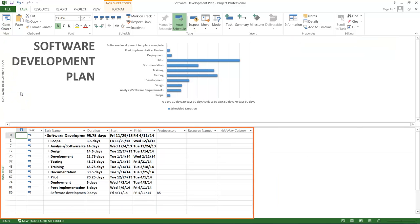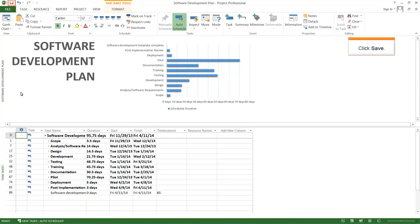The start and end dates of the tasks have been adjusted according to the finish date. Click Save to save the project plan.